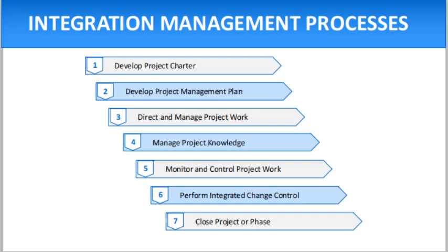Perform integrated change control. Changes to projects can sometimes be stressful if not handled properly, but with a change control process in place, they don't have to be. That's why change requests must be assessed to ensure they don't exceed the scope or approach scope creep, which refers to the increase in requirements during the project lifecycle. Some companies even have a dedicated change control board to review change requests related to budget, timelines, and resources.